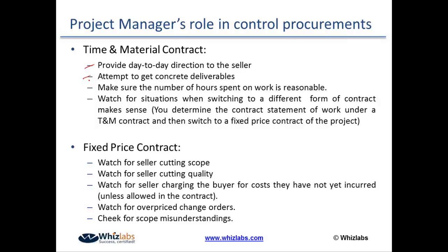For example, I initiated the project on a time and material basis because I didn't know what the actual solution was. Now, after spending a couple of months in the project, the vendor is able to find out the actual solution or actual root cause of the problem. So now I can go for a fixed price contract. I would tell them that, well, you now know what is causing this issue. Come up with the actual scope of the project and we will enter into a fixed price contract.